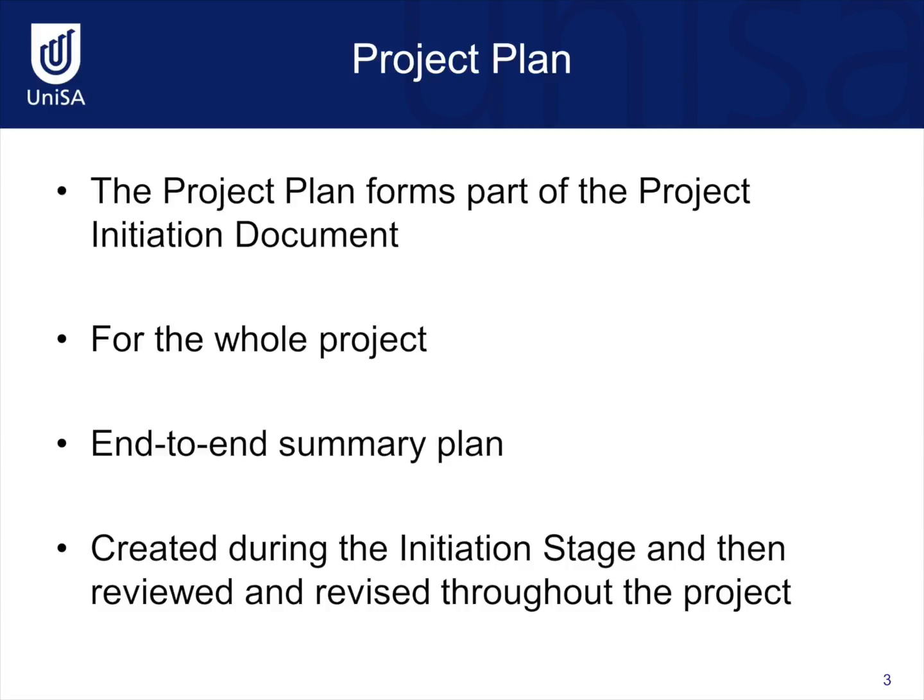The project plan encompasses the whole project and forms part of the project initiation documentation. It is created during the initiation stage and is reviewed and revised throughout the project. Why do you think the plan for the project is reviewed and revised throughout the project, and it's not a static document from day dot? Well, things are likely to change throughout a project. The requirements may change, a stakeholder may change, the timing may change, the budget may change, something else may change. If something does change, then the plan needs to be updated to account for that change having occurred.